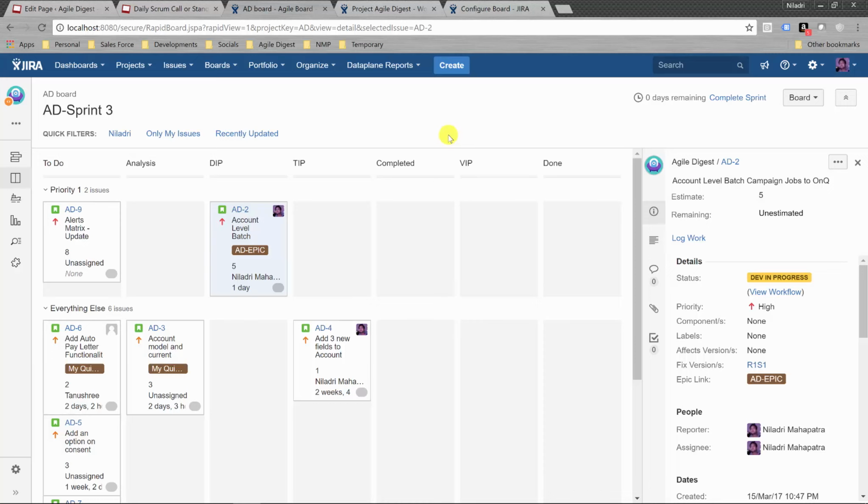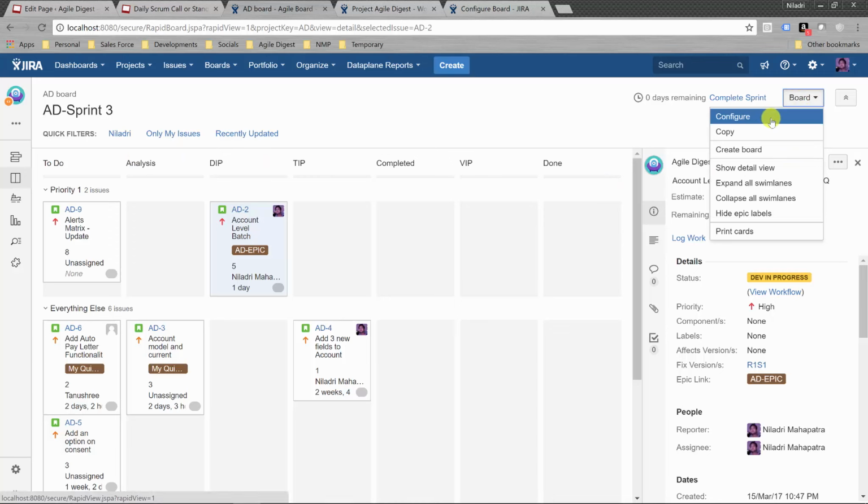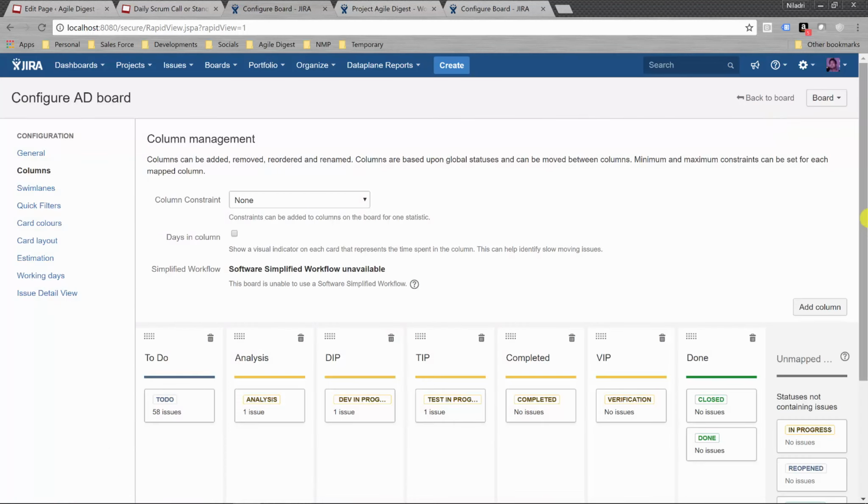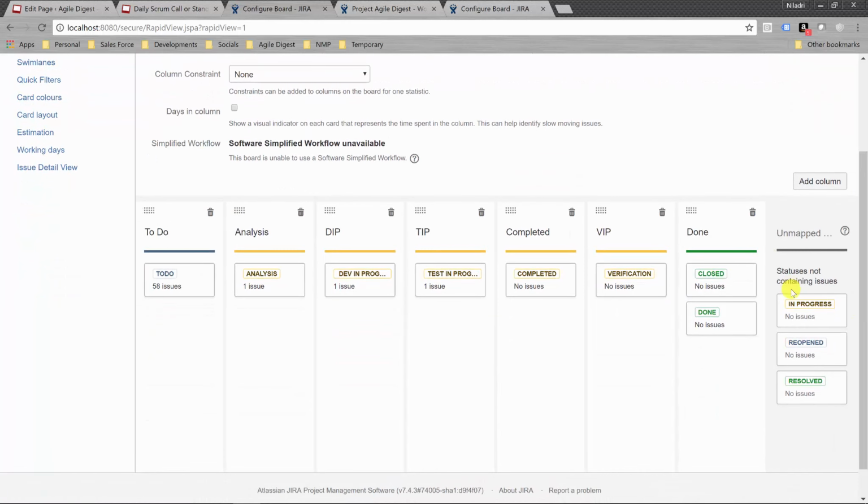So let's see how we can mark our story as blocked by using a state. This is the workflow you are seeing, and if you go into the board, I can click on board and configure. You can also use the three dots here if you are working on the cloud version, and you can see the board settings icon there. These are the board settings we have, the different columns and different statuses. What we need to do is create one more state called blocked or impediments, and we'll have columns for those blocked states to manage them.